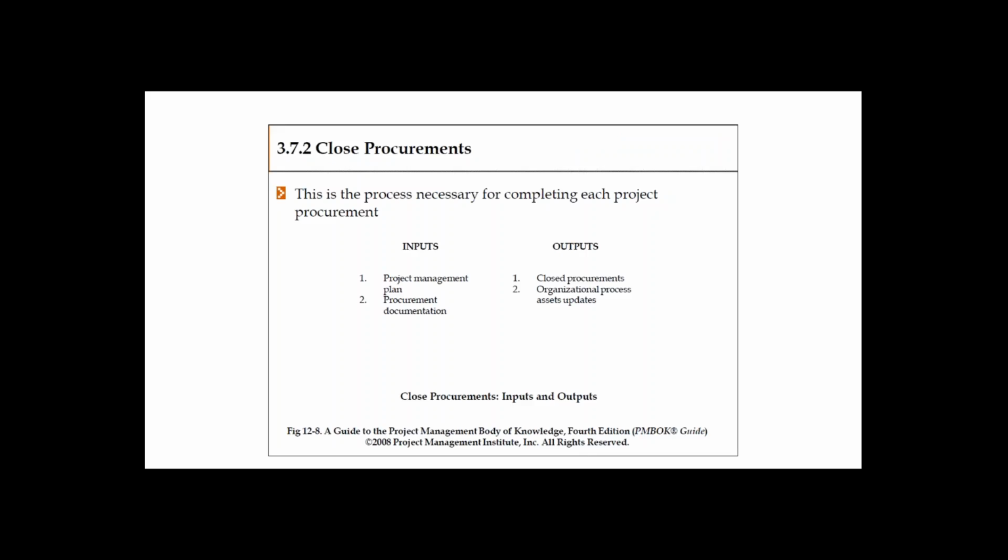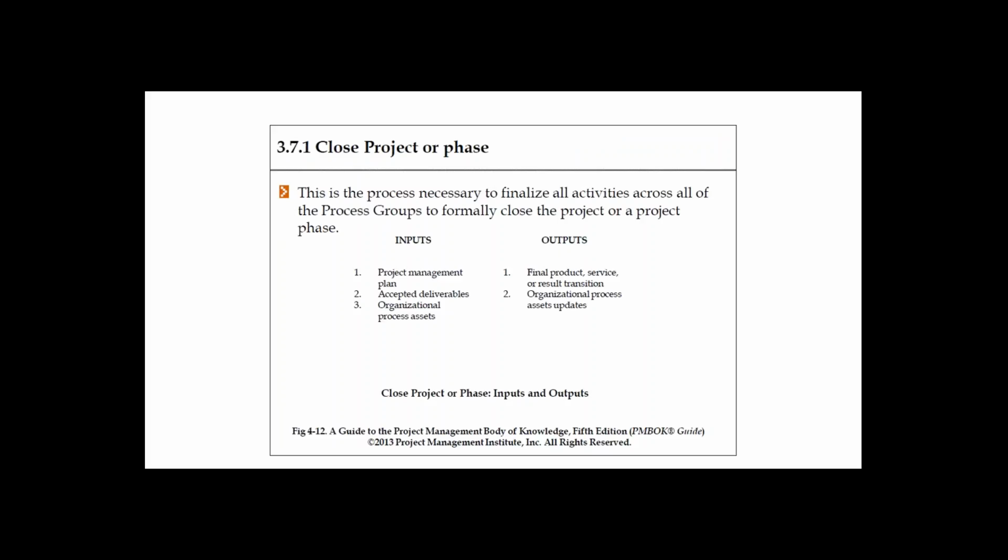But what is the difference? For example, the moment the work is complete, I take a sign off from the vendor as well as the stakeholders, and all the formalities are completed then and there. What is the different thing I'm going to do at the close of the project? We might have our own checklist at the end, such as did we close the procurements? Closing an individual procurement is totally different, because you are dealing with a single procurement.